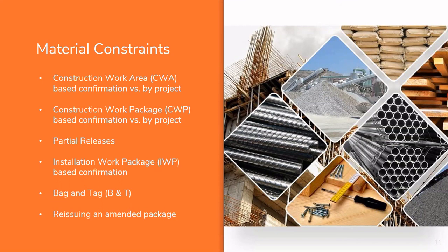Because the next size package we're going to look at are called installation work packages. These are the packages that go to the crews to assist them when they're doing their work. On bigger projects, these packages will typically be 1,000 to 2,000 hours of work. But if we're talking about smaller projects, the crew sizes will be smaller, the shift durations will be smaller.